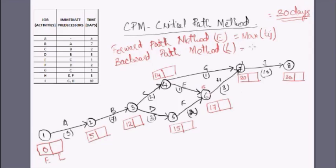Using the backward pass method, we move backwards from node 8 to node 1 to find the latest occurrence of time at each node. Since 30 is the project completion time, the latest occurrence at node 8 is also 30. Going backward, at node 7: 30 minus 10 equals 20. From node 7 to node 6: 20 minus 3 equals 17.